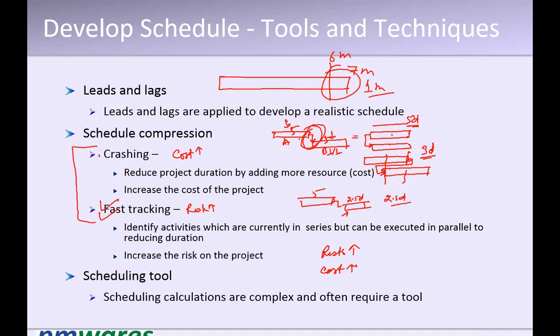So where you can do it, you have to find the feasibility, where the changes can be done. So you have to watch from beginning to end, the complete critical path, and figure out what you can do, where the dependency can be changed, where the additional resource can be added. You cannot add the resources anywhere. It has to be feasible, right? So we need to check the feasibility of doing crashing and fast tracking. Only then can you apply. So it may not be possible everywhere.